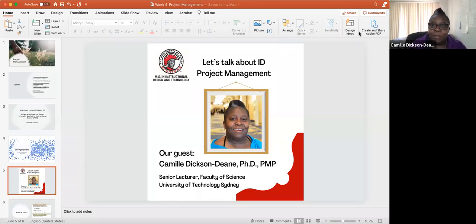What does that mean? So in my project plan, not only do I have the physical move, but I also have to upskill the academics to encourage the physical move. That's how I'm managing my risk. Because if I don't upskill them, they will move across and then their delivery will fail. Does that make sense?